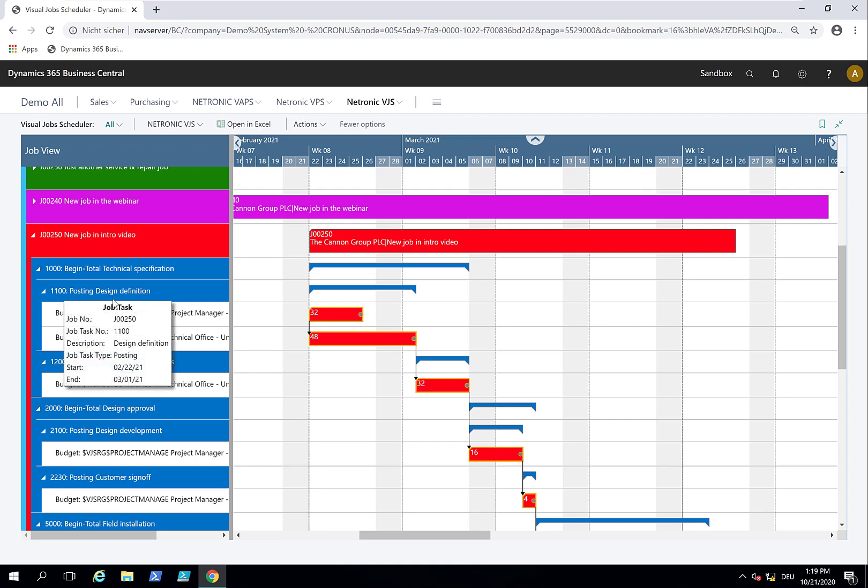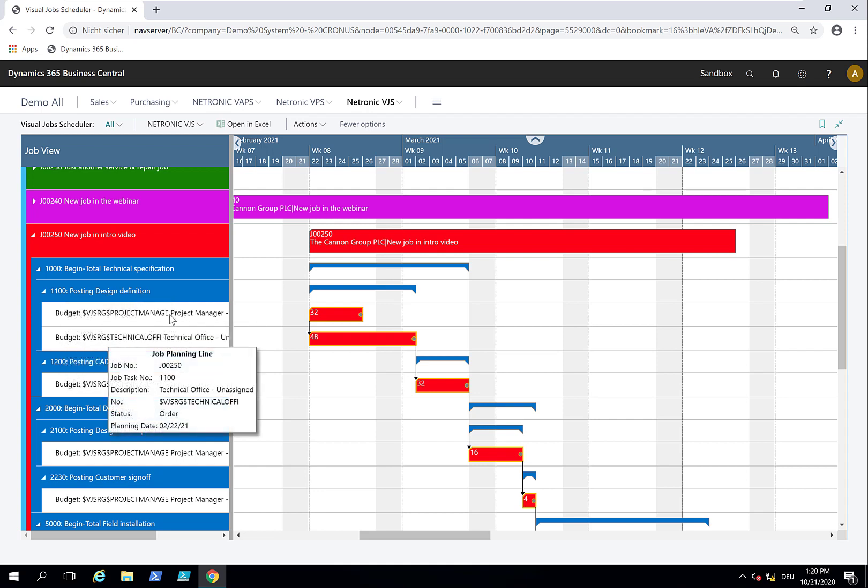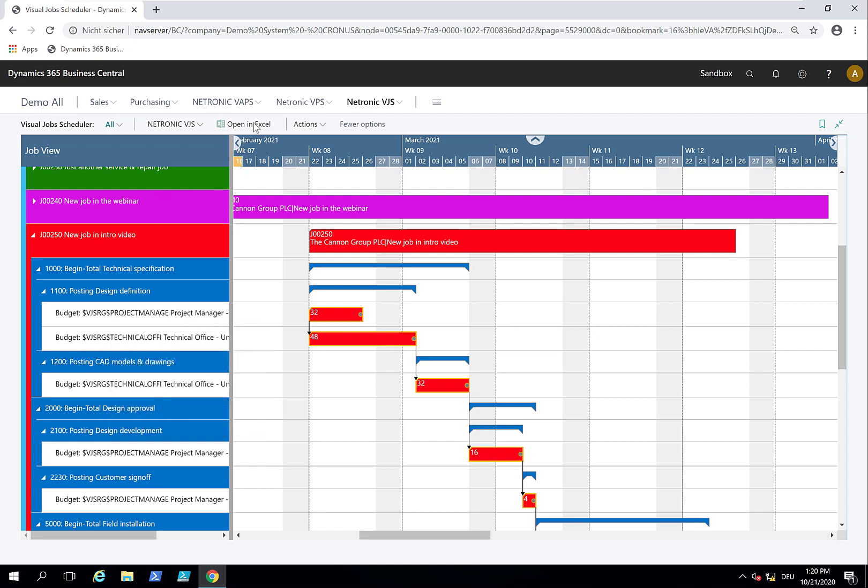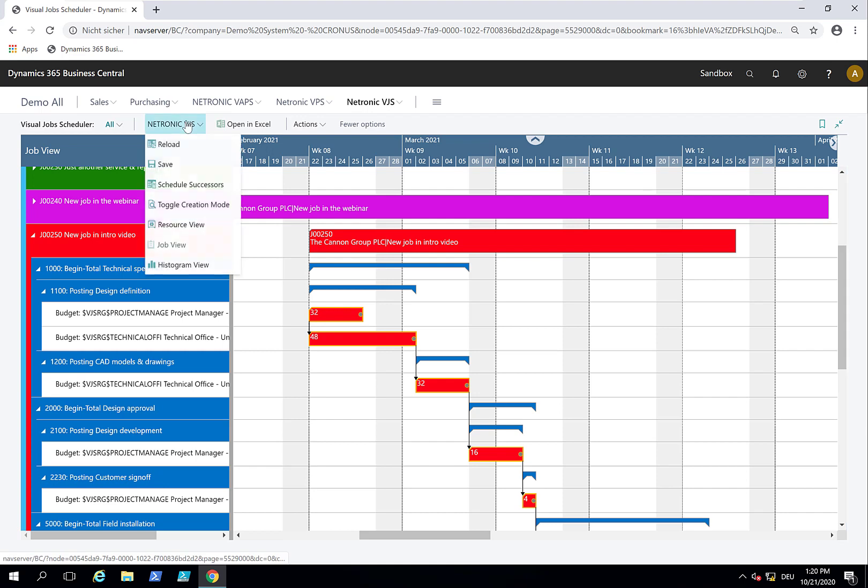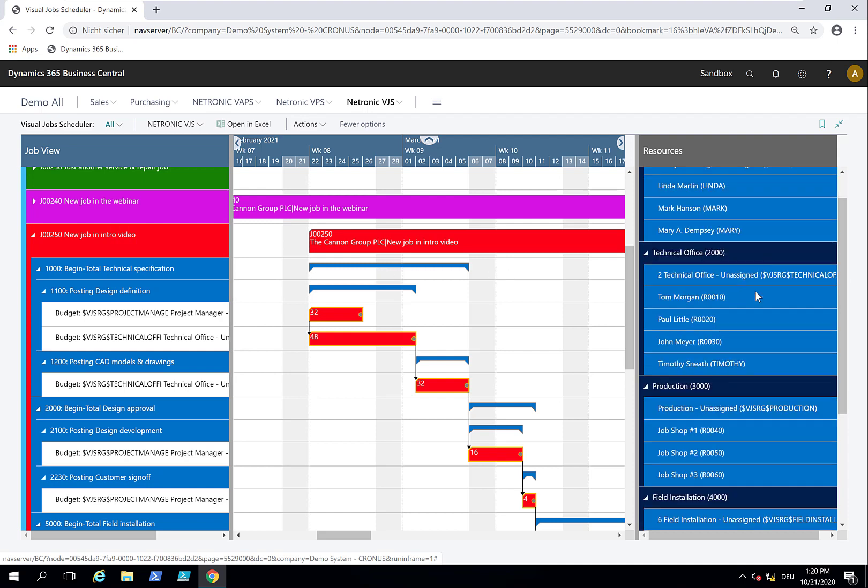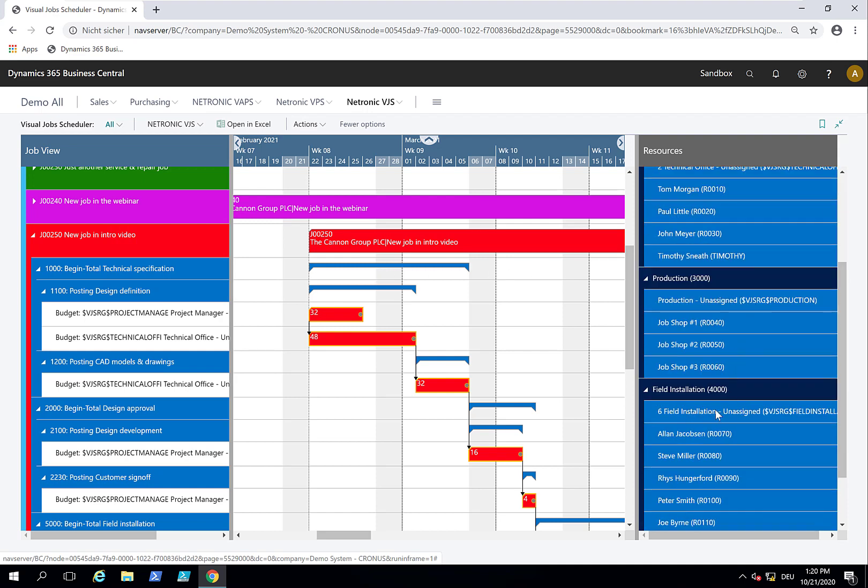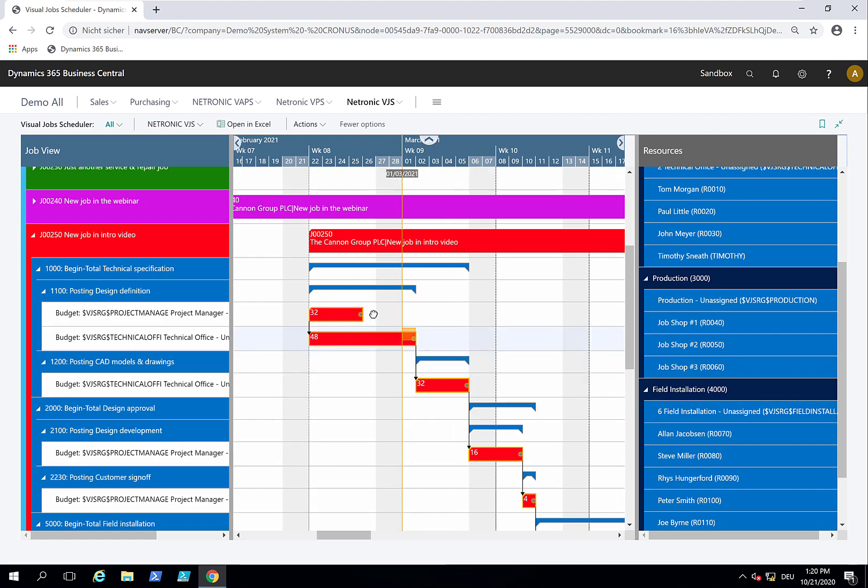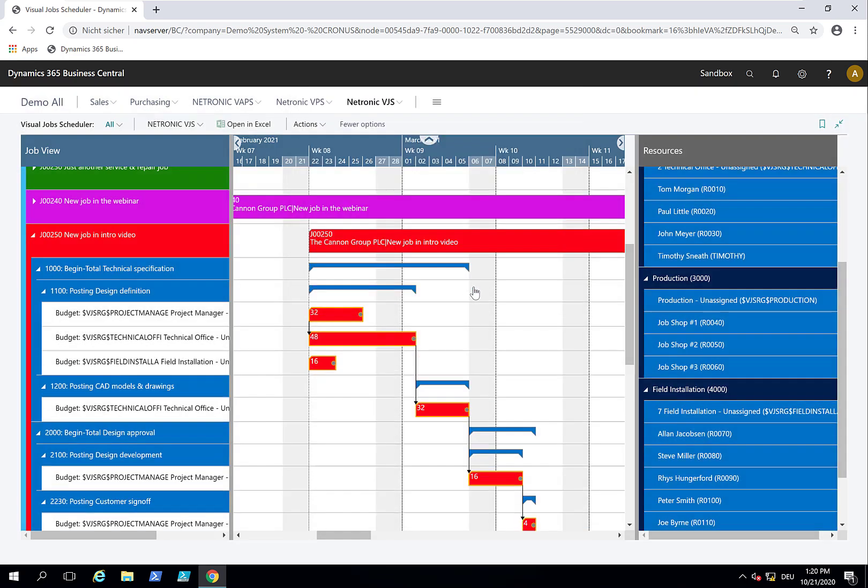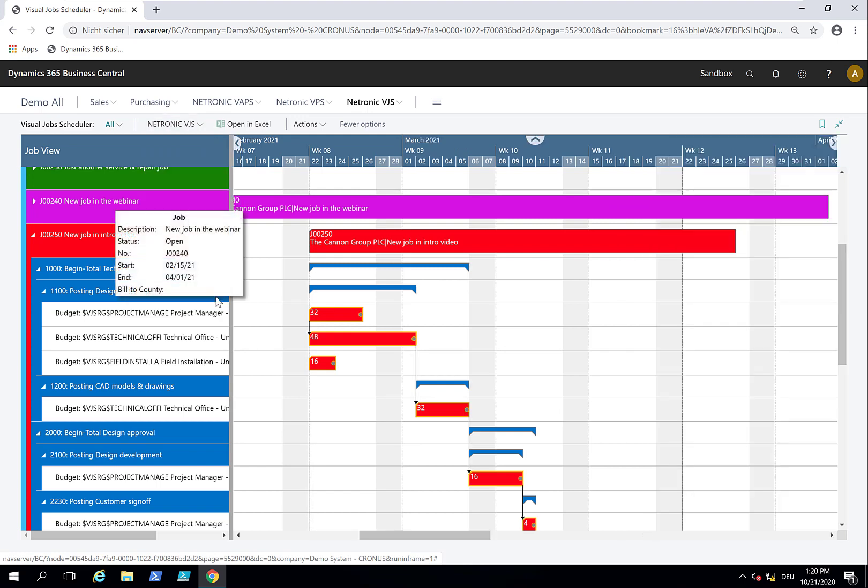For the design definition, we need a project manager and somebody in the technical office. Maybe I want to add another resource to this task. I go to toggle creation mode. We also need somebody who is responsible for the installation later in the definition of the product. I drag this resource from here and drop it into here. This guy needs to help us at least for two days in the beginning of the project while we kick this off.